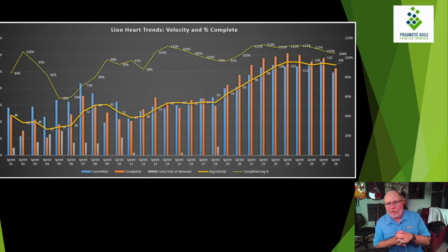Okay, so I observed for a few months, and I realized that they weren't even really doing Kanban. I mean, there was nothing they were doing in Kanban that was correct. There were no WIP limits. The board itself was not clear. It wasn't well designed. They didn't have exit criteria. All right. They weren't collaborating. They weren't slicing stories small so that they could create a flow.